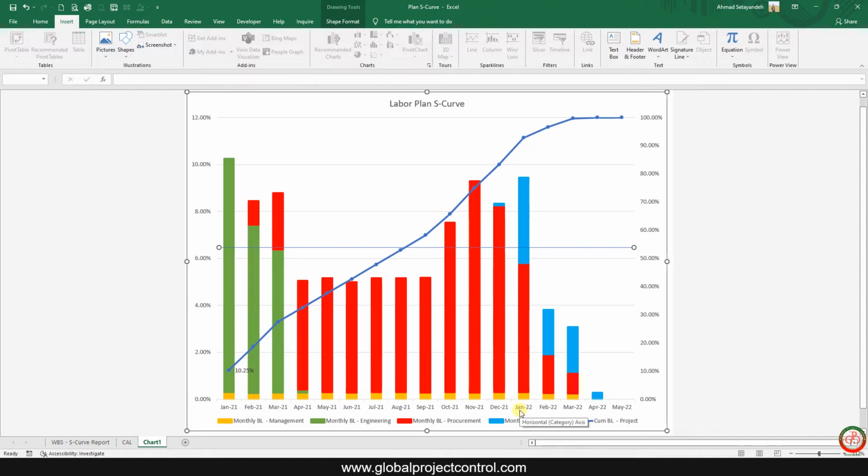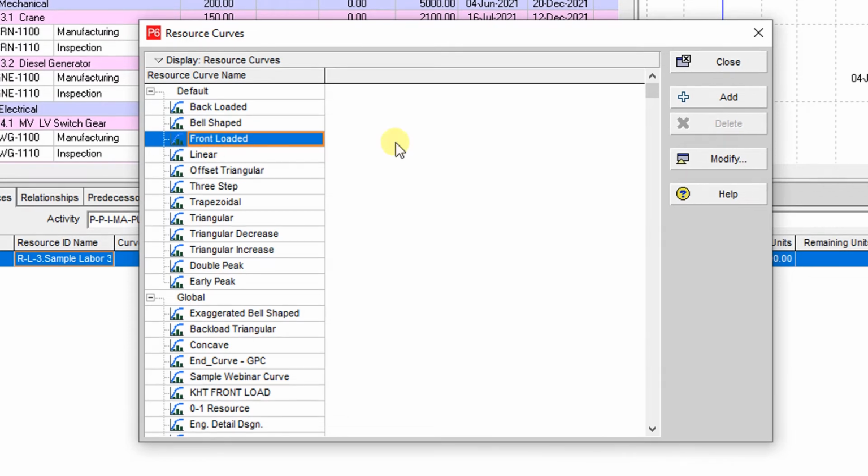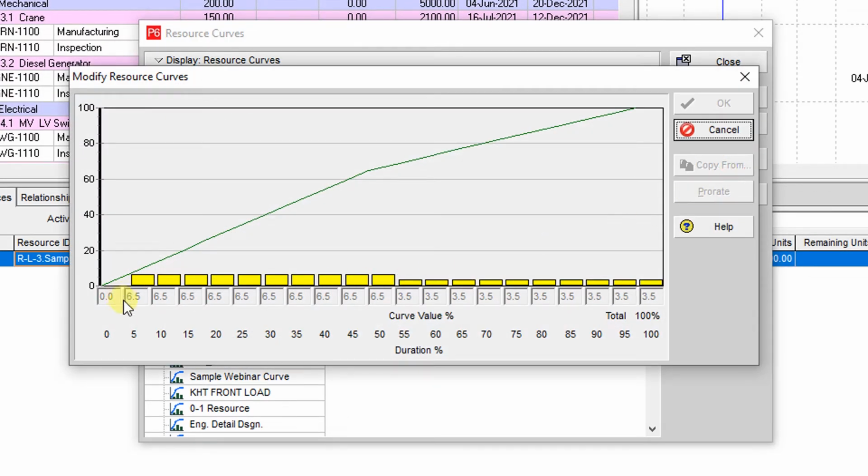This effect is not reflected on your time. It only pushes the project to earn the progress earlier because we are looking for a better distribution of the resource curve. We want this distribution to be near the average, but let's do the front load. We have some possibility of front loading.